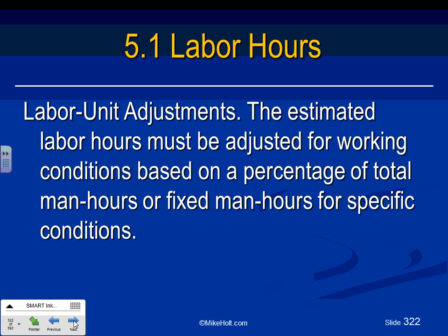Labor unit adjustment. Before you assign a dollar value for your labor, you're going to sit there and say, here's my 25 hours to do this job, or 2,500 hours. Should I adjust it based on certain conditions? So they go through what's called labor unit adjustment, guys, and there's a couple of things that you have to do before you assign a dollar value for them.